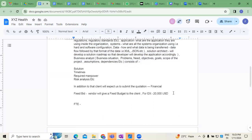Whenever we go for fixed bid, every cost will be calculated — salaries, miscellaneous expenses, infrastructure cost. Infrastructure cost means the kind of systems and workstations people are using for the project. Also, licenses: that's a major expense. For example, in the healthcare application we are developing, the presentation layer may use HTML, DHTML, PHP, and the business logic layer may use Java. You require some database like Oracle. Some third-party tools are paid. There are two things: open source and paid tools.